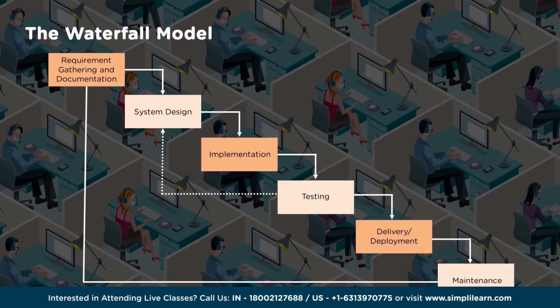But the challenge comes up when the dynamics in the market, when the dynamics of customer changes. Customer asks for change, then you may require to do the change. Now, when you want to do that change, you may require to do that change only after understanding what would be the impact of this change in the entire output which you're going to create, which is very comprehensive. Because of this, it consumes time, it consumes extra effort. So it may be a scenario where the scope of work is reduced as well. Even after that, this exercise has to be done, which will delay the project.